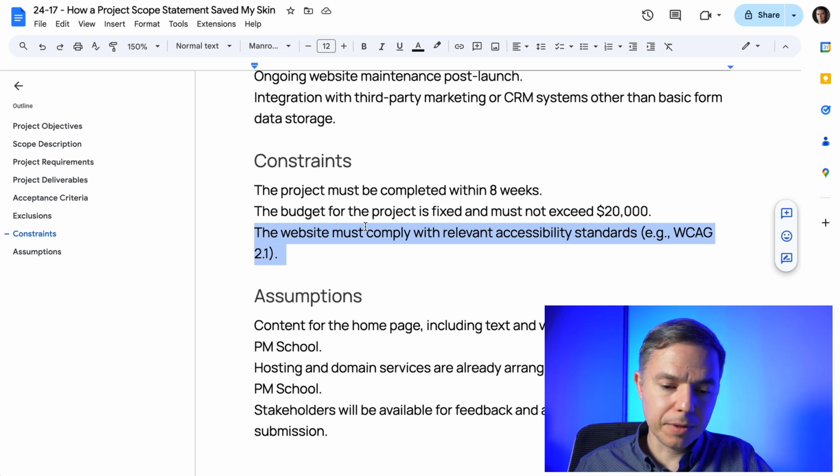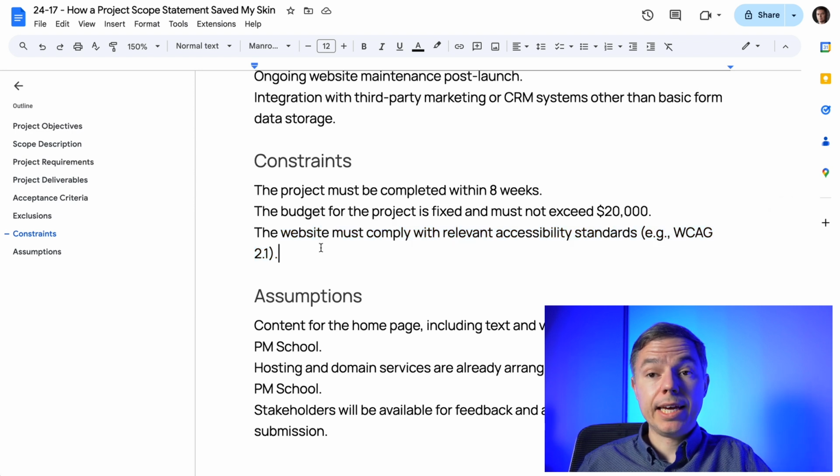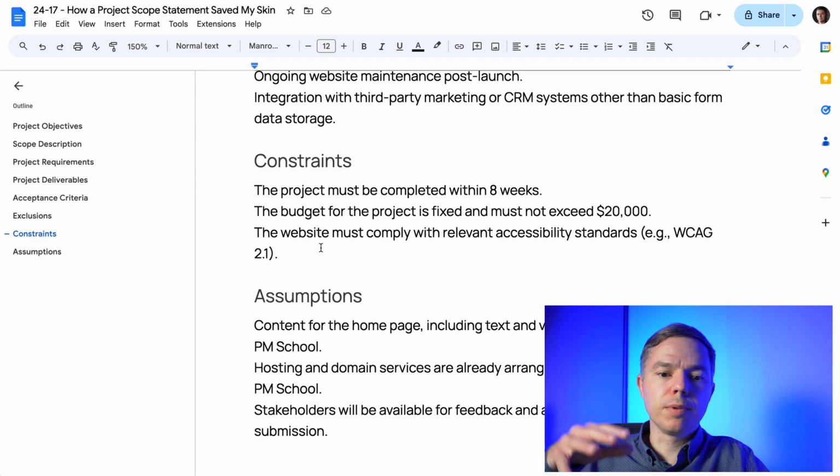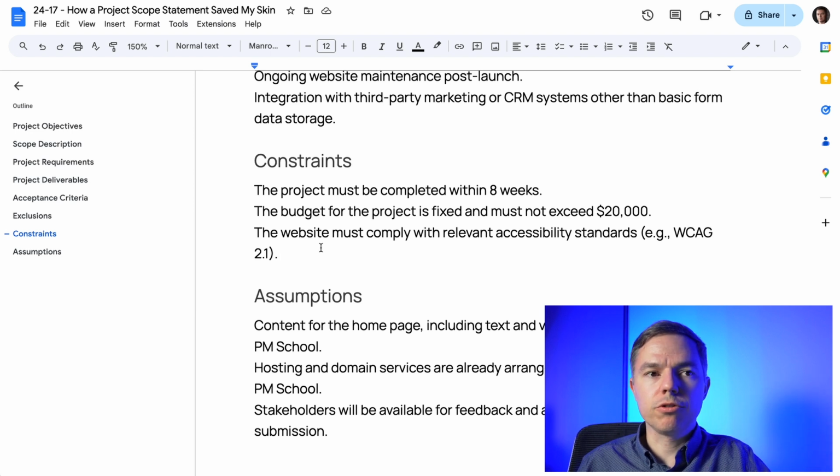And if we don't implement them, then the site is not that useful for our target audience. You may imagine another constraint from a technical or business perspective when, for example, we create a new corporate website and we must deploy it. There will be some constraint to say that, okay, during working hours or business hours, we should not disrupt the work. Therefore, you can deploy this site only during certain periods of time.